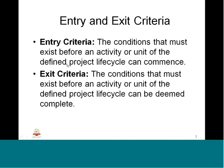Exit criteria are the conditions that must exist before an activity or unit of the different project life cycle can be deemed complete. That means before we announce that a cycle or that activity is complete, there are different conditions or criteria that need to be satisfied — those are all called exit criteria. These two are very important items used in defining the software life cycle. For each stage, stage 1 will have entry criteria conditions and exit criteria conditions; similarly stage 2 will have entry and exit criteria for that stage. All stages of the life cycle must have entry and exit — these two must exist for moving into different stages of the life cycle.